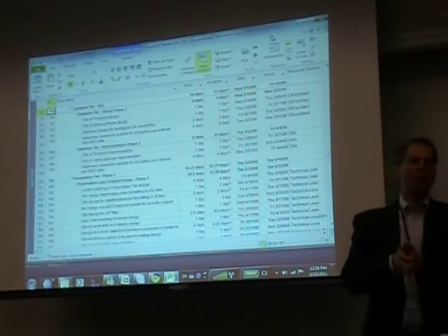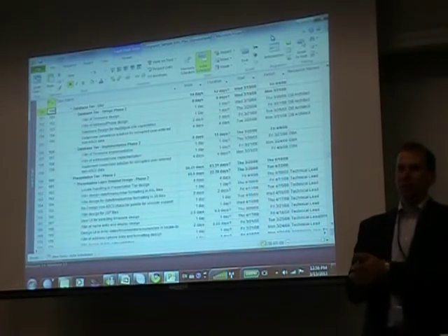Then we have a merge phase. You can see in phase 1 we have a QA. This is a two-phased approach, so there was something that we were doing as a phase 2. It might have been the Unicode enablement. I don't remember what this was, but you can see here time zone and address, phone numbers, and the like. So we phase that within the various presentations, and we have multiple code merge points. After phase 1, we had a code merge point, and after phase 2.